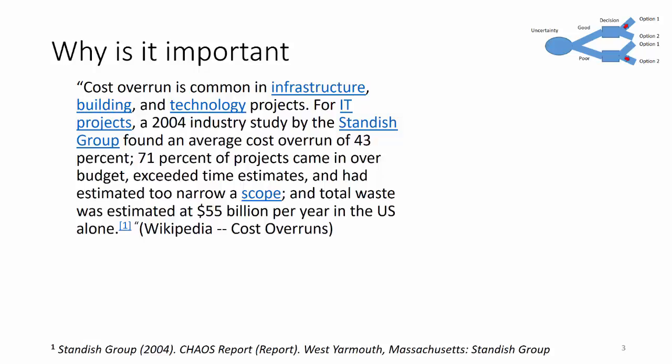So why is it important? Cost overruns are common in all kinds of projects. A 2004 study found an average cost overrun of 43%. 71% of the projects came in over budget, exceeding time estimates and an estimated too narrow a scope. The total waste was approximately $55 billion per year in the U.S. alone.